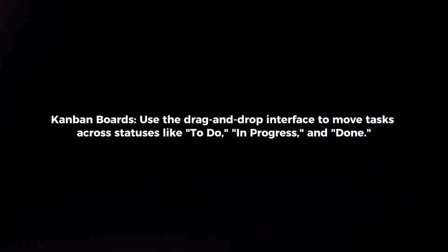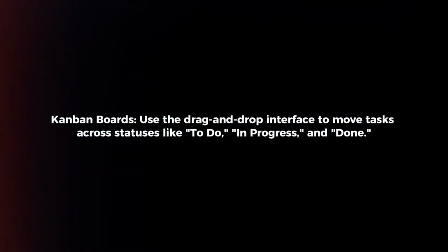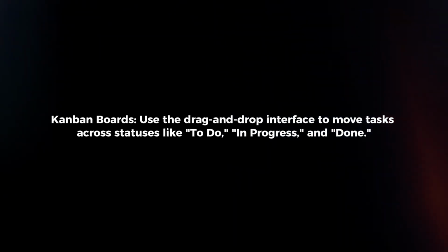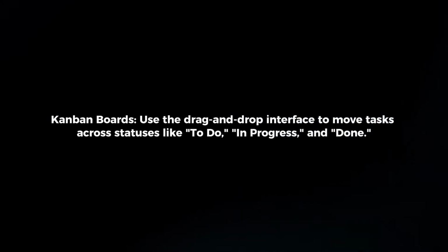Organize sprints. Plan sprints by assigning work items to specific iterations or timeframes in the board section. Kanban boards. Use a drag and drop interface to move tasks across statuses like to do, in progress, and done.